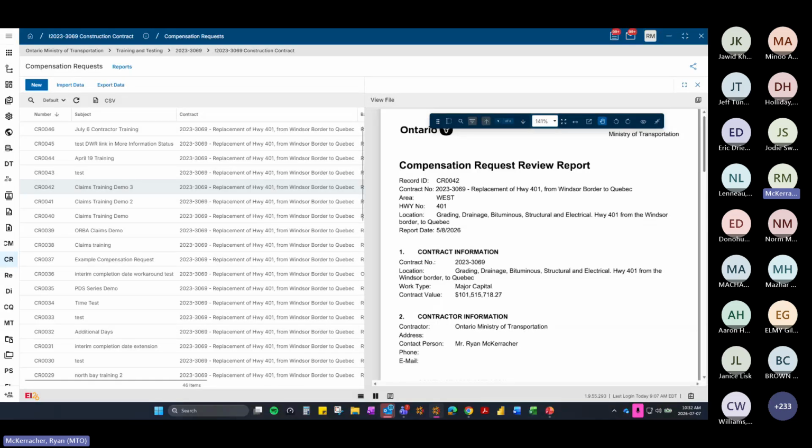So does the CA need to wait for the contractor's estimate to request approval of the change initiation? No, the change initiation comes before the contractor's estimate is submitted. The change order can't be issued without the change initiation garnering DOFMA approval first. So the initiation comes first, then the approval, then the issuance of the change order, then the contractor's estimate.